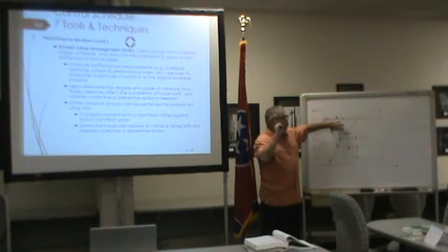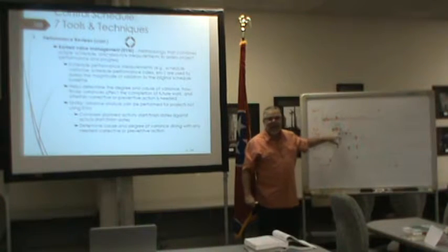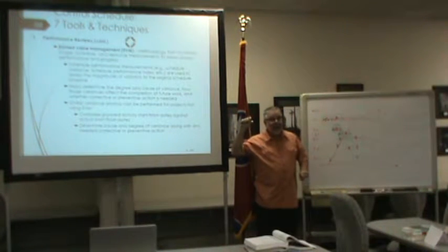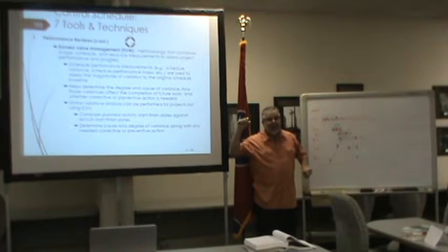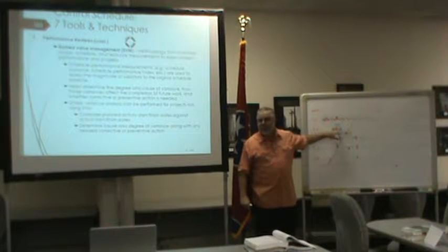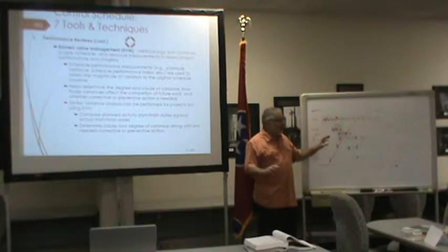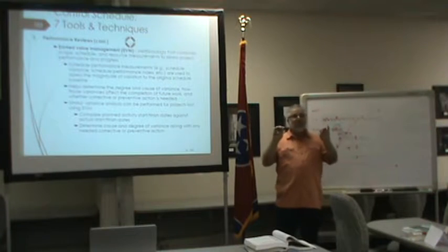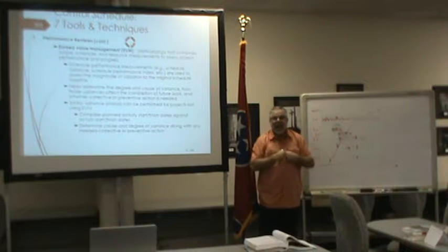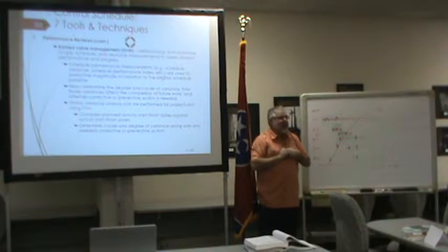Okay. But when I do my earned value calculation, what do I claim? 10,000. Every time. If it took me 8, I still claim 10. If it took me 12, I still claim 10. Does everybody understand that? Whatever I estimate it to be, that's how much value I can claim. Do you understand that? So see the importance of budgeting appropriately, because when I come back to claim value, what value am I going to claim? Whatever I estimated it was going to take.